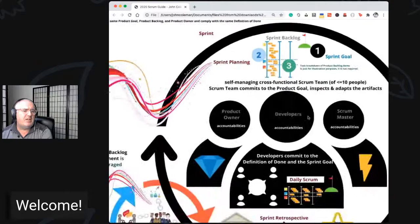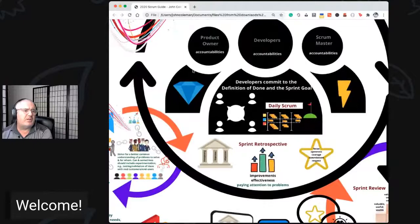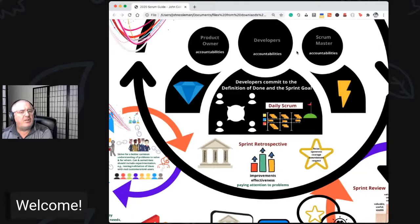In the 2020 Scrum Guide there are now accountabilities instead of roles. You have the product owner accountability — maximizing value — the developers committing to the sprint goal and delivering value as part of the Scrum team. The Scrum Master for the first time is now on the hook for the effectiveness of the Scrum team, which is interesting: a self-managing team, but the Scrum Master is responsible for the team's effectiveness.